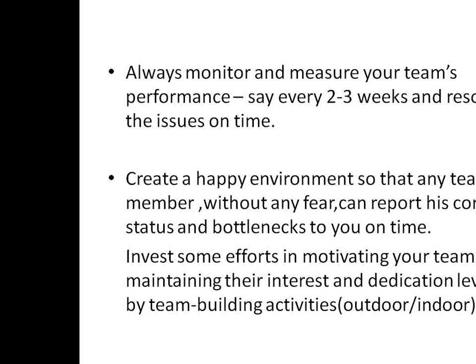And then try to resolve the issues on time. Suppose one of my team members is not performing well, I can maybe delegate his piece of work to somebody else and exchange the work. Give him a low complexity work, and give the higher complexity work to a team member who is performing better than him. Because see, nowadays it's very difficult to remove a team member and hire a new team member. So I have to swap the work delegation, change the piece of work. This I can only do if I know how each of my team members is performing. I have to measure their performance. It should not be a shock to me that after 2 months I realize, oh, this guy is not performing in my team.